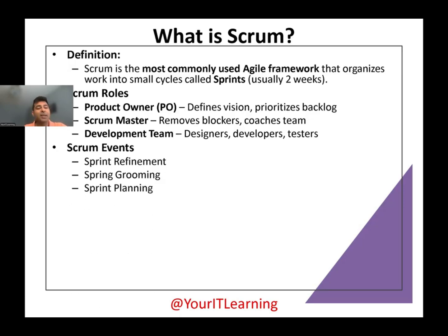Sprint planning: this session is before the sprint starts. So you plan what needs to be built, what user stories we will be bringing into the next sprint. Daily stand-up: this is a 15-minute session every day where everyone comes and basically answers what they have done yesterday, what they are going to do today, and if they have any blockers.